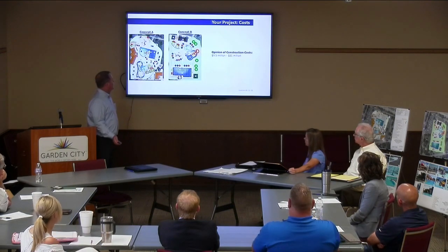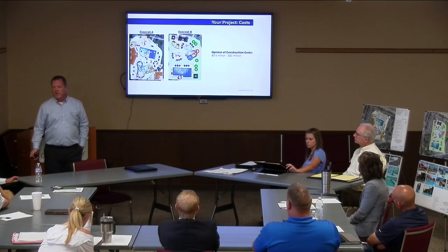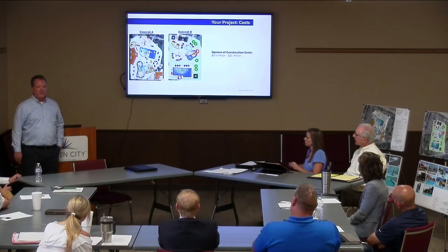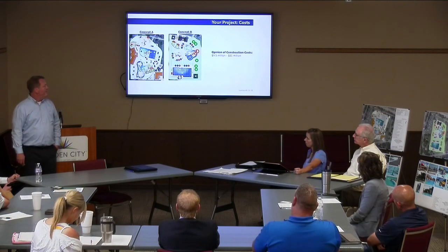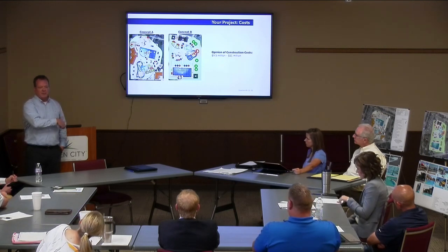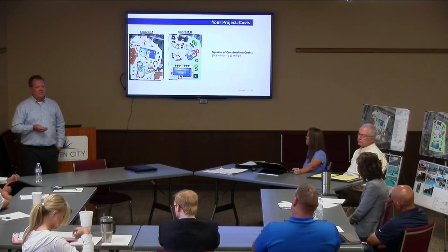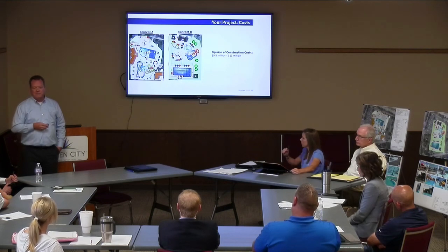So for each of those, we're doing budgeting, so we're trying to give conservative budgeting estimates. As we get into more detail, hopefully you can refine the concept and the budget would come down a little bit, but at this point we're trying to give a nice conservative budget, taking historical data from past facilities and projecting it out. We're at least a year or two, I assume, out from your facility, so we're trying to be conservative in that way.